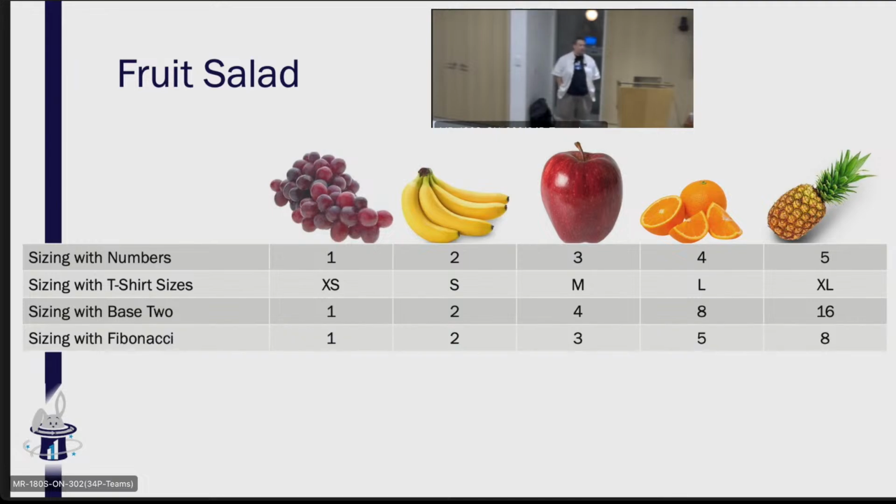A lot of teams use the Fibonacci sequence where the next number equals the sum of the previous 2. So you've got 1, 2, 3, 5, 8, 13, 21, 34, 55. I don't know where it goes, 80 something. After that, Fibonacci's nice, but you'll notice that all of these are just ways for us to bucket the numbers. The numbers and letters and things that we're doing all mean the same thing. So whether we're using a 4 in our sizing with numbers or we're using a 5 in the Fibonacci sequence, it just means it's sort of this bigger than